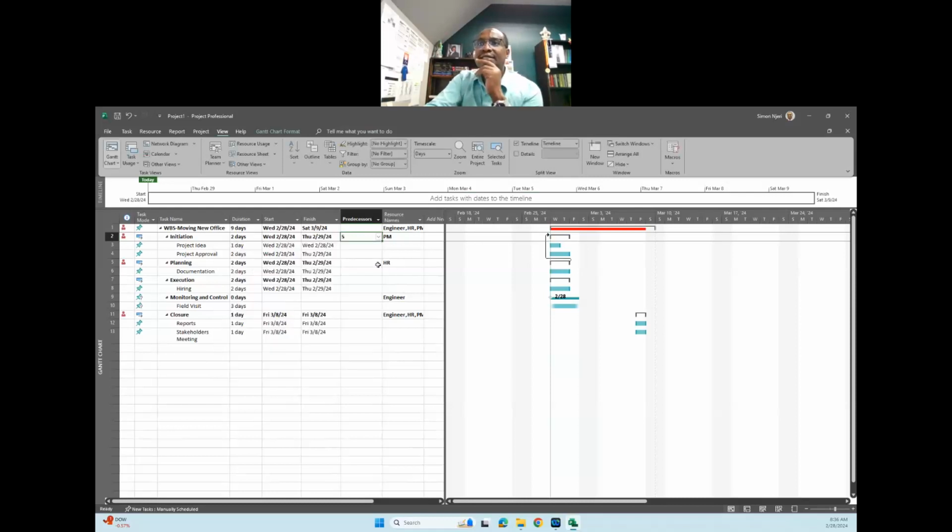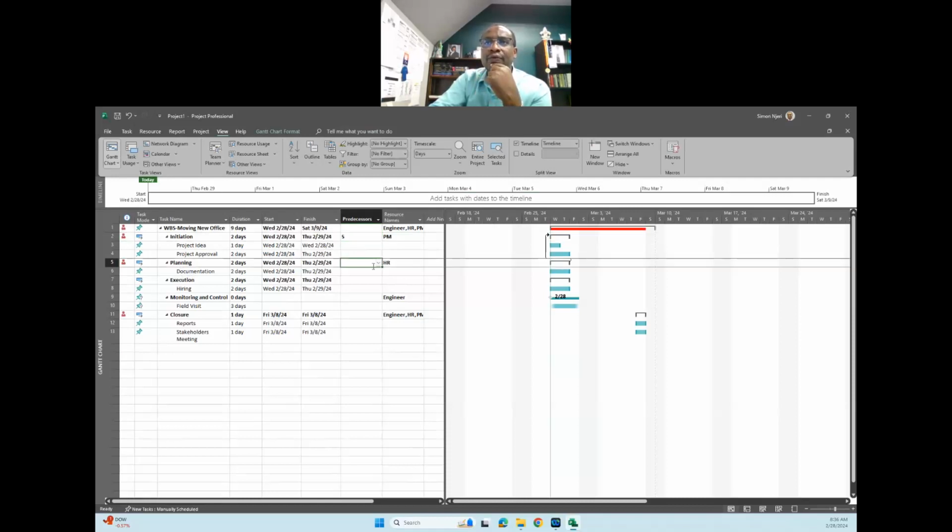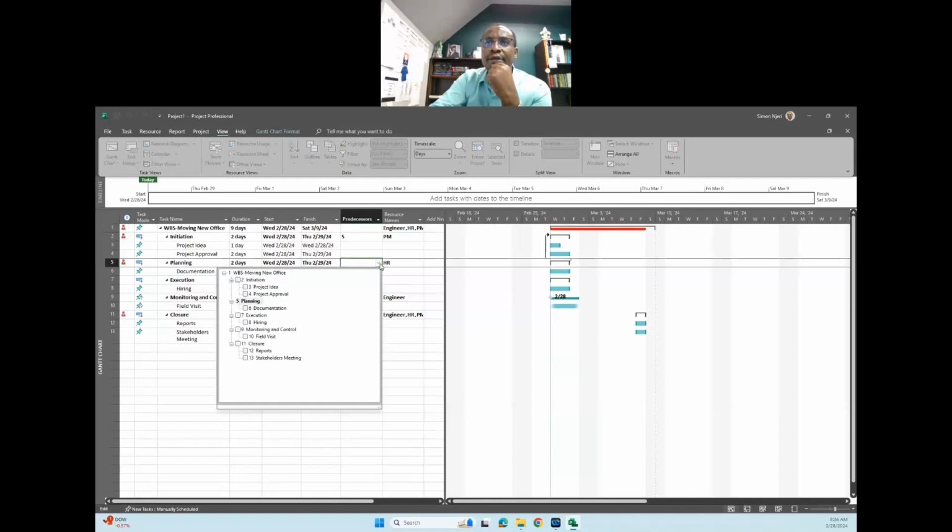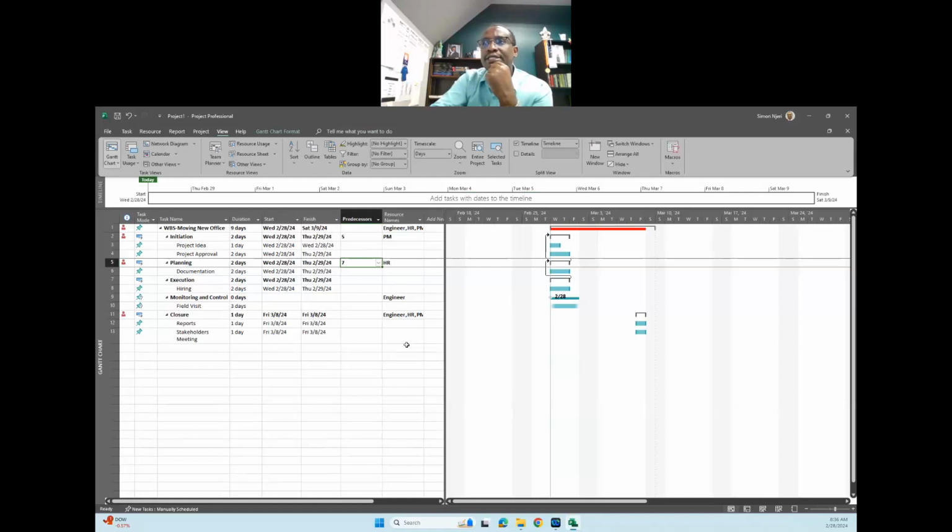If I click that one, you'll see something has happened. So there will be 5 days between initiation and planning. And simply, if you just check on what is happening at the planning level and the initiation, it shows it will take 5 days before planning is executed. Let's check on planning and see what will happen if we pick on execution and click outside. It shows like the project will take 7 days.